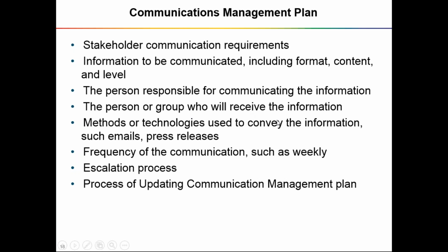Methods or technologies used to convey the information, such as emails, press releases, and sometimes video bytes and webinars. All those things have to be defined. Frequency is very important. Status reporting can happen on a daily basis if it is mission critical. It can happen monthly for senior management, and there is some middle level of management who want it fortnightly. So frequency has to be defined depending on the needs of the different stakeholders.